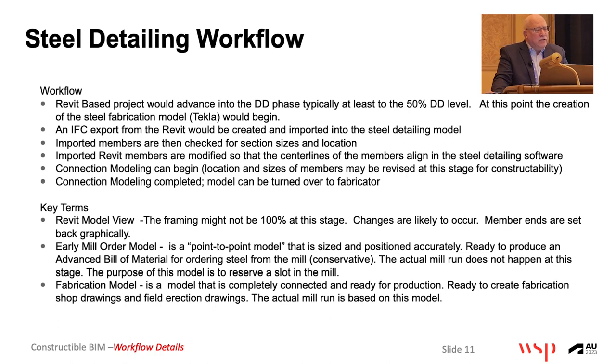The point is, when you hand it off to the Tekla modelers, you're going to have to know where it is. The model has to close dimensionally, and you sort all that out. I can tell you from firsthand experience, when we go through the old-fashioned process, we get lots of RFIs related to dimensions. This takes that out of the picture.